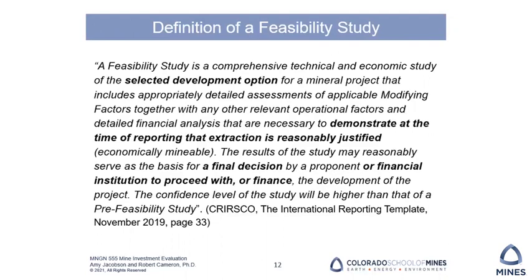The results of the study may reasonably serve as the basis for a final decision by a proponent or a financial institution to proceed with or finance the development of the project. The confidence level of the study will be higher than that of a pre-feasibility study.